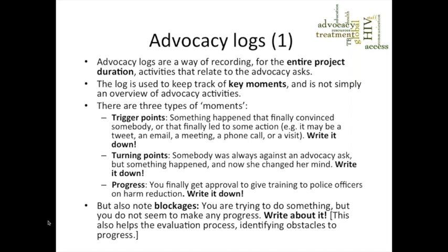I met so-and-so this morning. He or she seemed to be changing their opinion about this. You write it down. The advocacy log is usually used for recording three types of things. First of all, trigger points, where somebody might have changed an idea because of you talking to them. So you write it down.